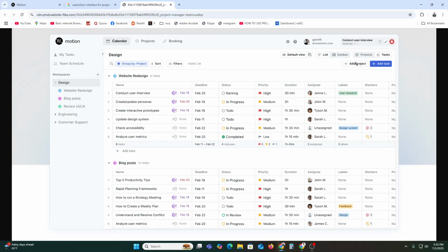Your project is completed. So you can add tasks to the project also. Here you can see this is the Add Task option. So inside your new project, like you already created a project and now you just want to add a couple of tasks for your work. So give each task a name. For example, it could be design home page, design product page, design about page. This kind of task you just need to add. Then you are allowed to add a due date, estimate time and priority, and assign it to yourself or a team member. Keep adding tasks until your project is mapped out.